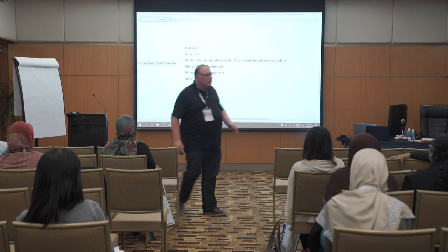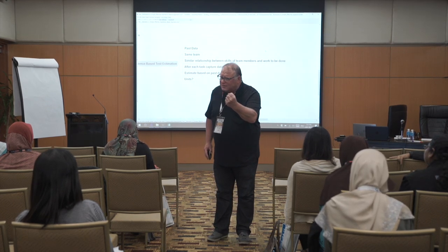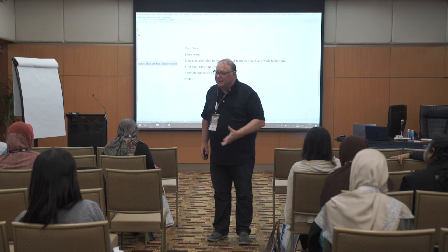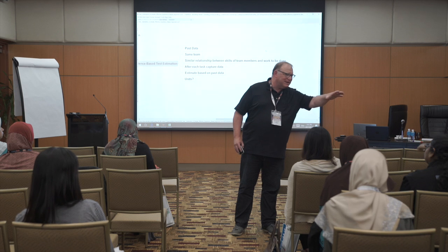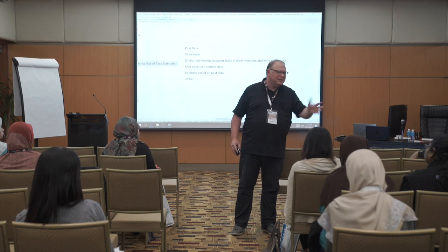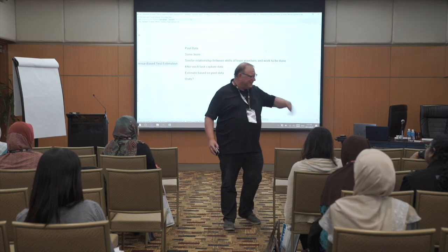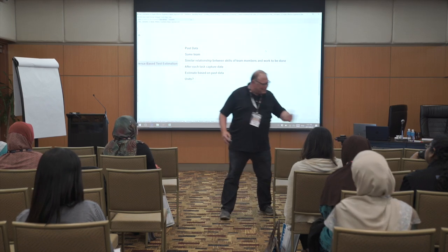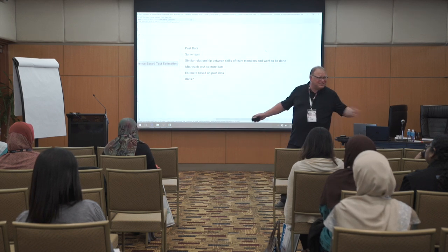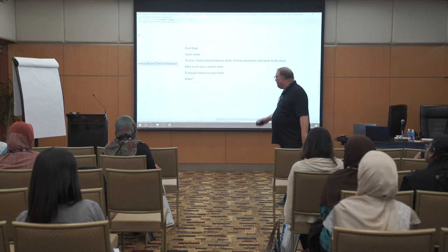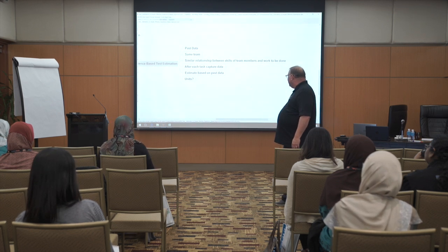This estimation technique only works if the relationship between the skills of the tester and the work they do is similar. If it changes dramatically, let's say you're doing manual testing once and then automated testing with another tool next, your estimate's not going to be effective. You'll have to start again, because the relationship between skills and work changes, and that's true with any estimation technique, not just mine. I want to highlight that. So after the task, what we capture is this.